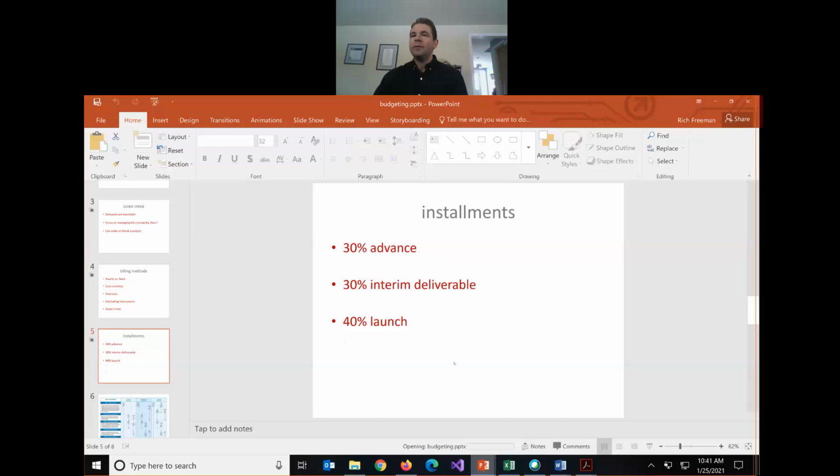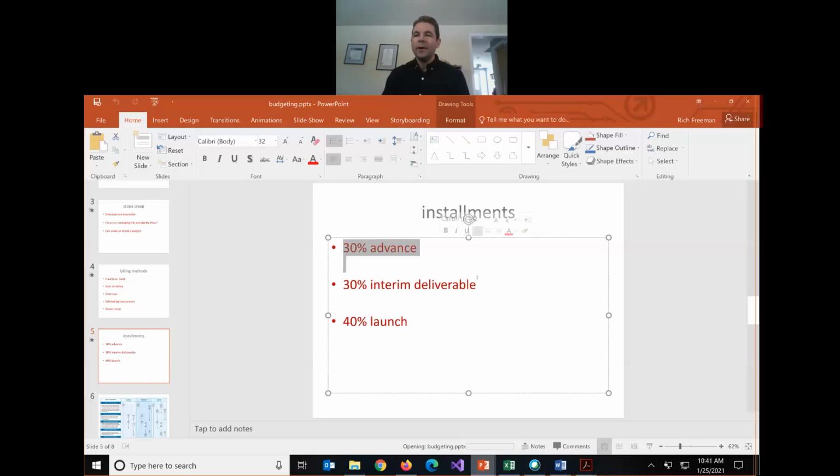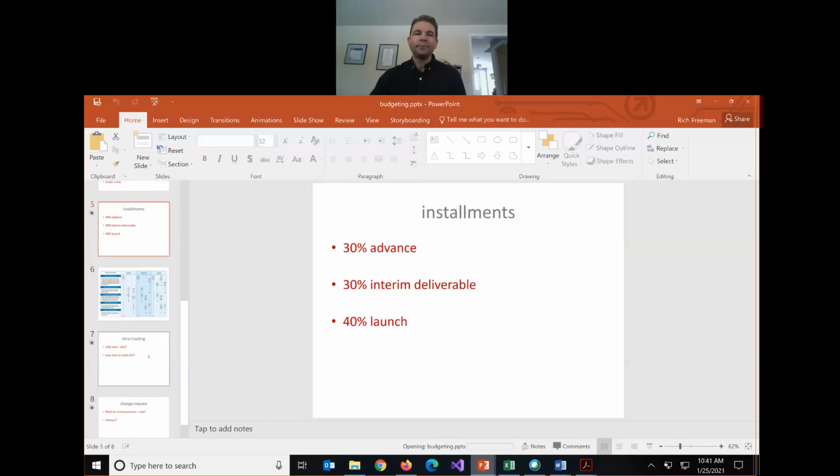And typically it's normal that we bill in installments. We typically, in web projects, get somewhere in the neighborhood of 30%. When our client signs the contract, we invoice them and we don't start working until they pay that advance. That's typical. You should not bill the full project and not expect to get paid until the very end, because if your client chooses not to pay you, you've now done all that work for nothing. So typically 30% upfront, 30% somewhere in the middle, and 40% at the end is pretty typical.